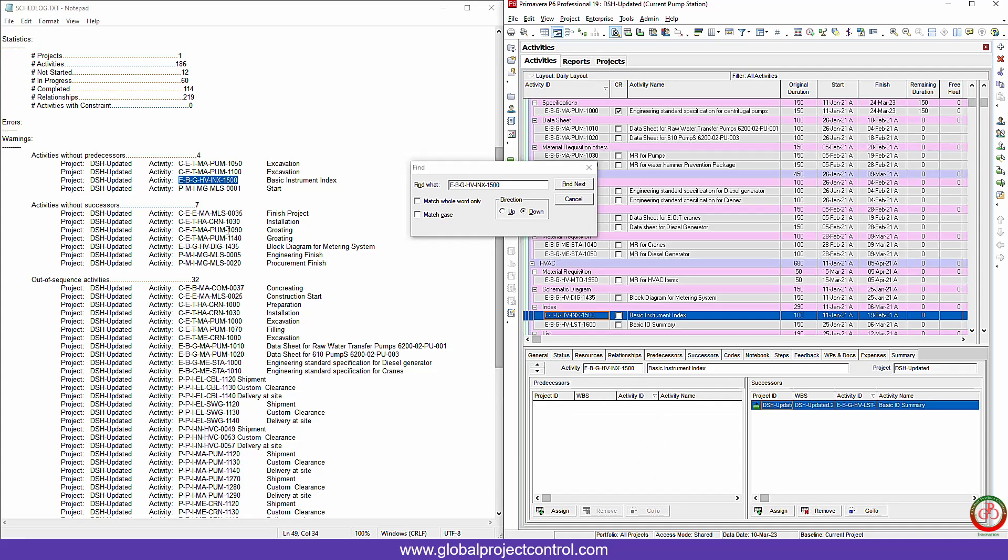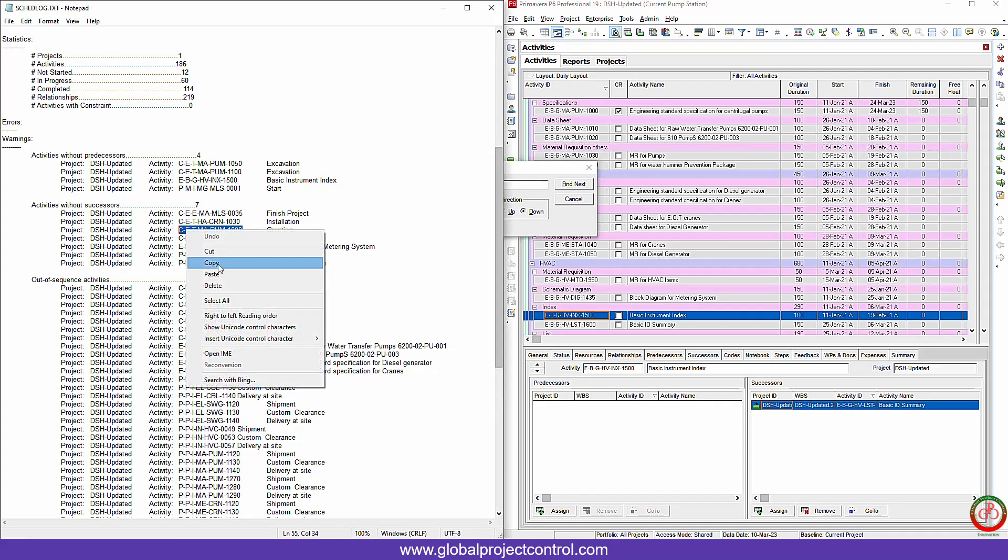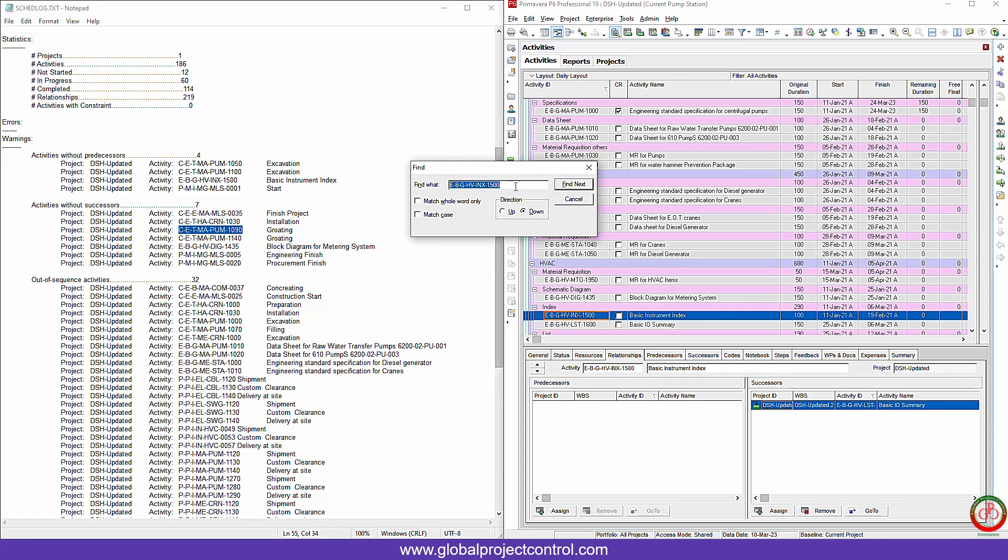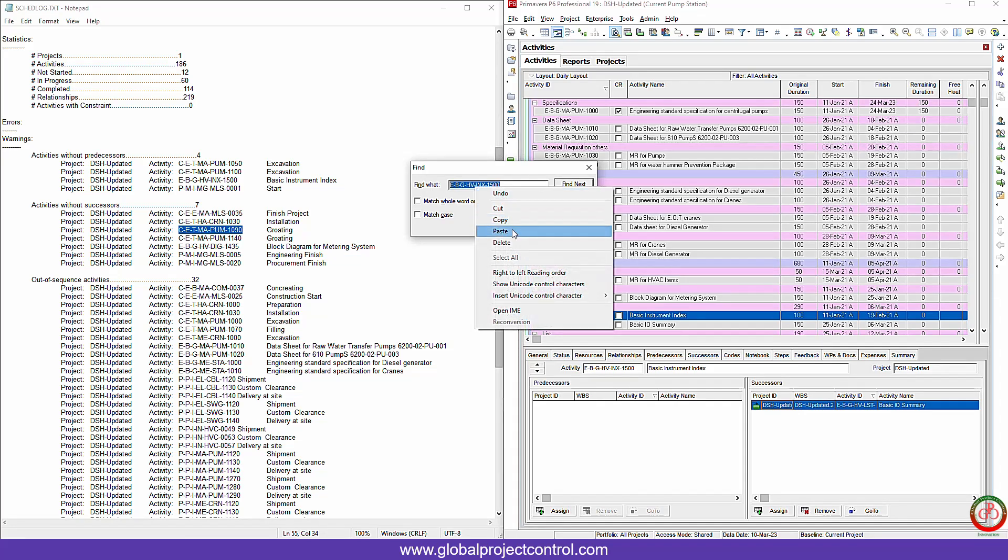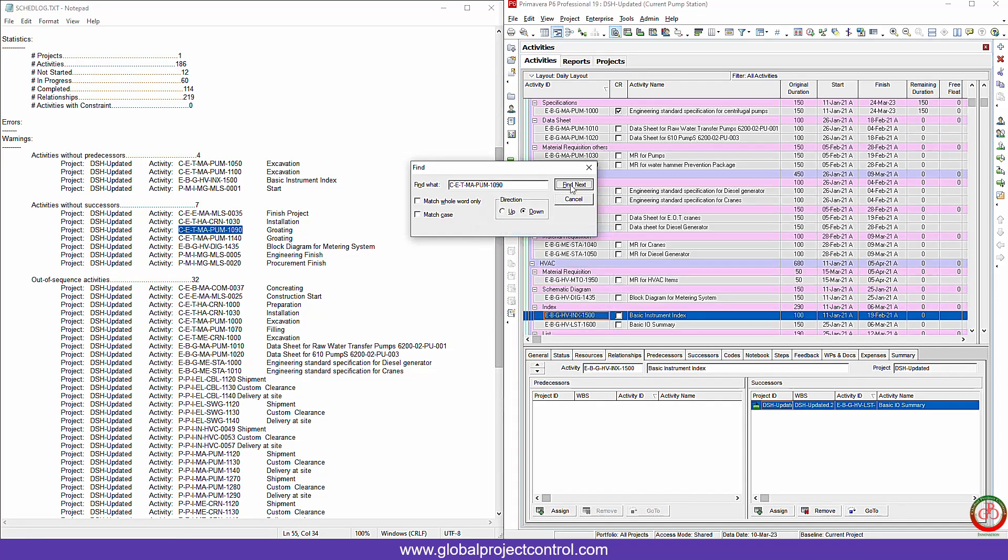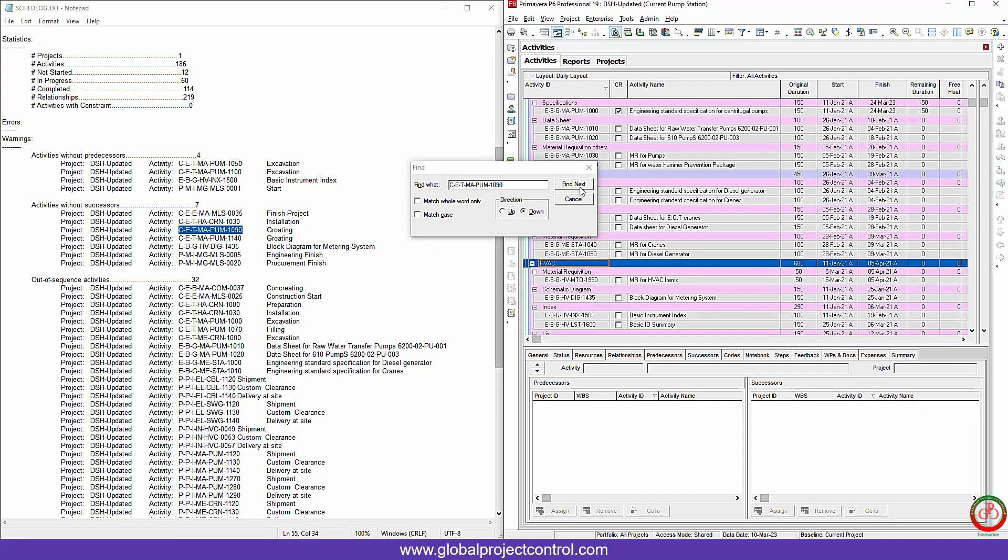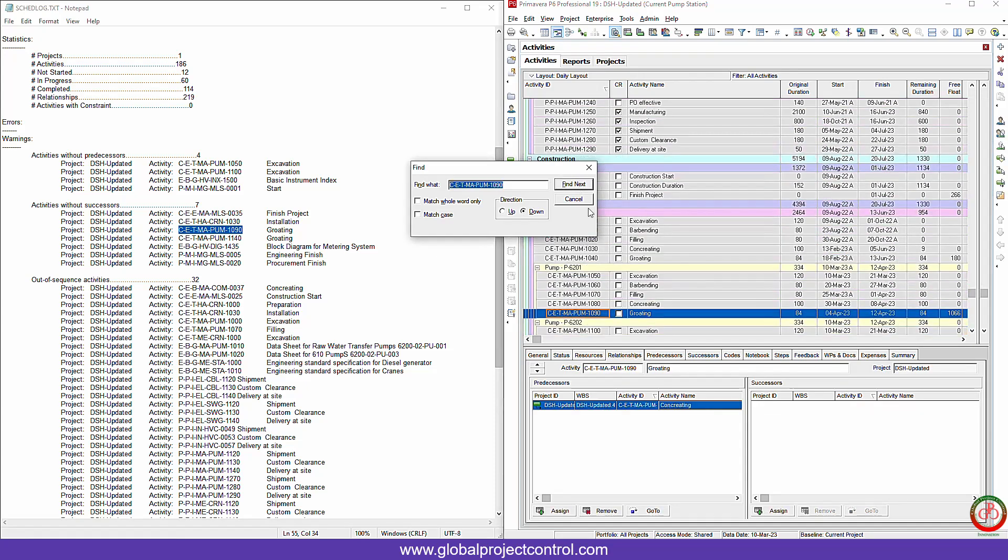Over here, for instance on the grouting, I have the same issue but this time for the successor free. If I go through it, you will see that it is successor free task. So we need to fix this kind of issue before we want to send this schedule to our client.